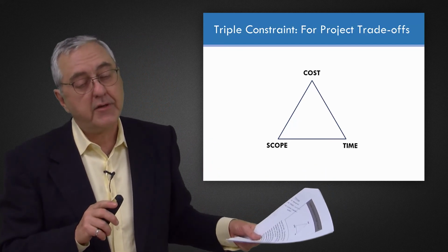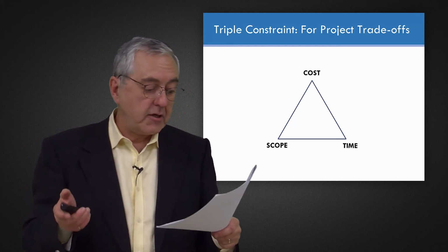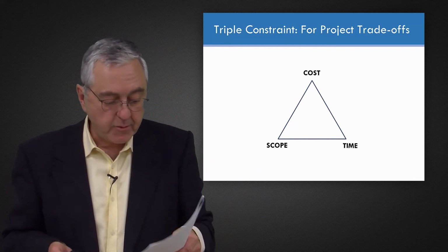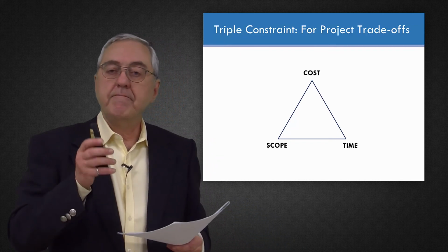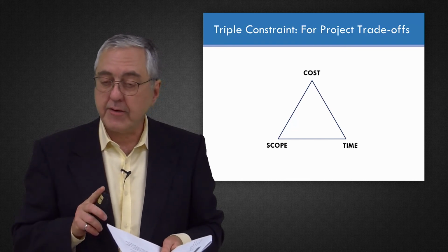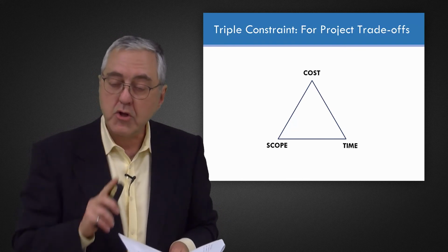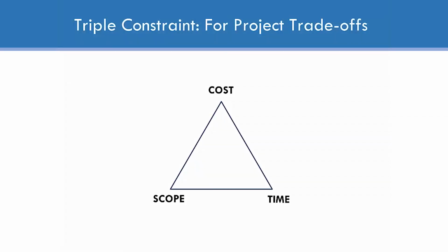It led to significant quality issues. They had some significant failures, a shuttle exploded, for example, and a Mars exploration venture failed. They gave up on that phrase. Your customer or your management can't specify all three of these. They can only specify one or two, and you have to get back to them with your plan for what the other one or two are.